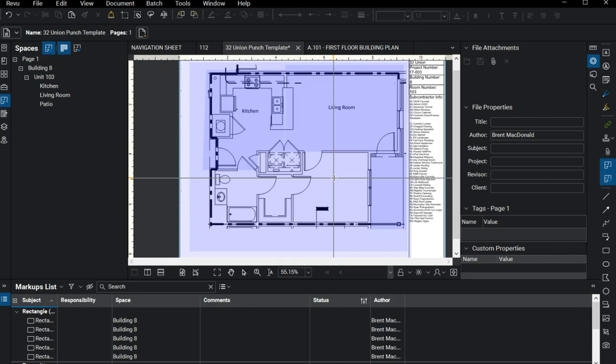You can create this as a clean set for the MEP contractors just before we start the installation and drywall phase of the project to do a quick punch list walk, quote unquote, for their completion of items that need to be done prior to closing the walls up. So again, this can be used in multiple phases, all depending upon when you complete it.